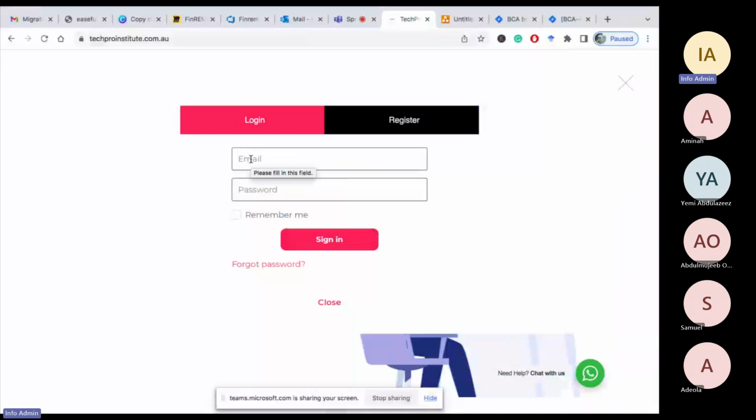Post verification will be done during an outage window. It might be after hours, between 6 o'clock and 7 o'clock. Some can even be early in the morning, around 5:30 to 6, when users are not expected to be using the application, because you have to do the PVT in a live environment.